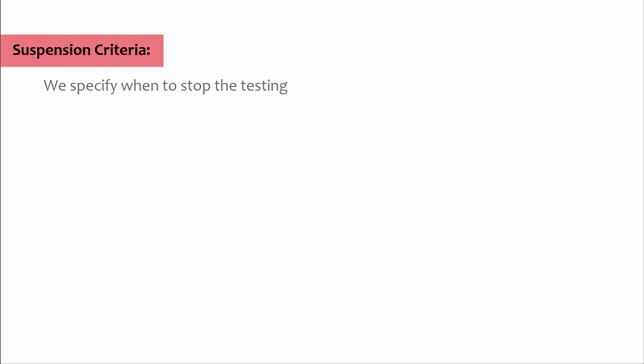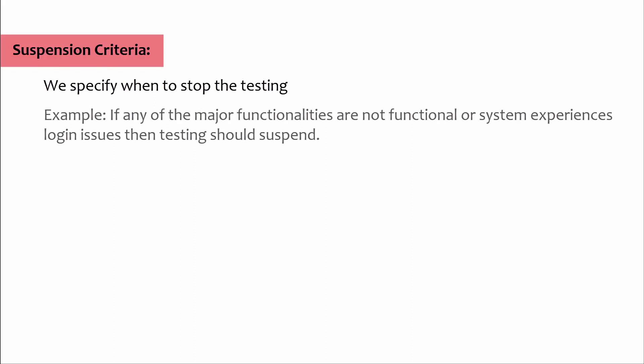Suspension criteria: In this section we specify when to stop the testing. Example: if any of the major functionalities are not functional or system experiences login issues, then testing should suspend.